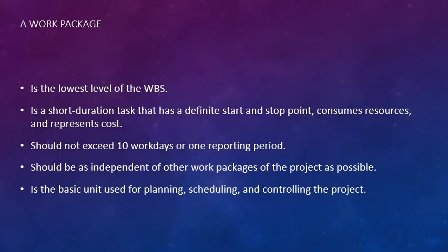They should be as independent of other work packages for the project as possible, and they're the basic unit used for planning, scheduling, and controlling the project. So we're going to have our work packages, and that's how we're going to know what's going on.